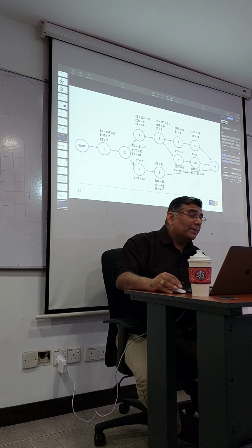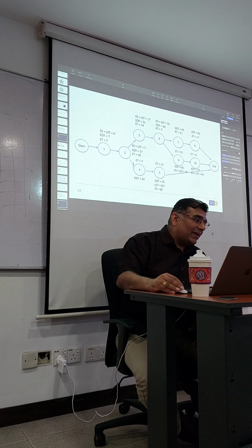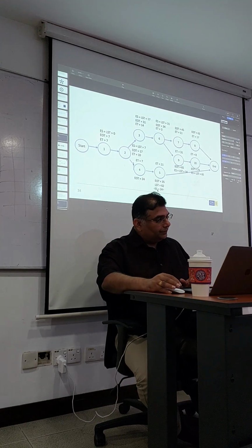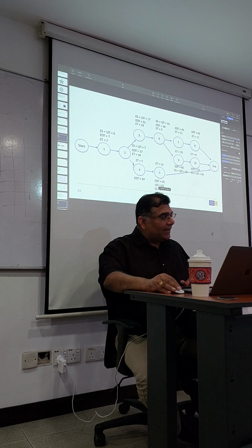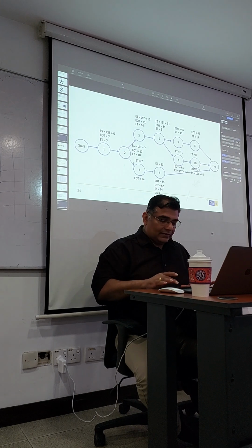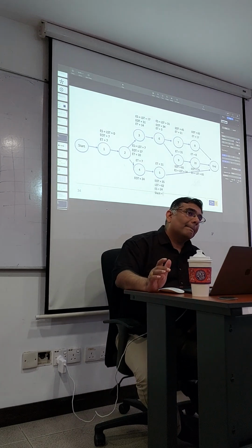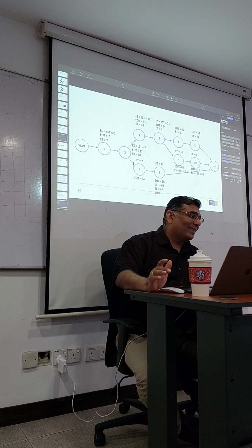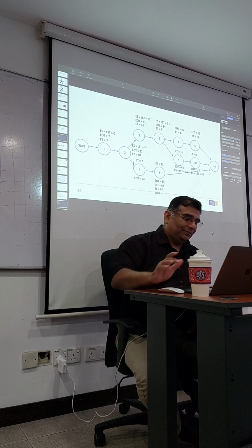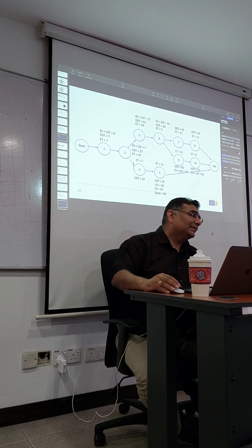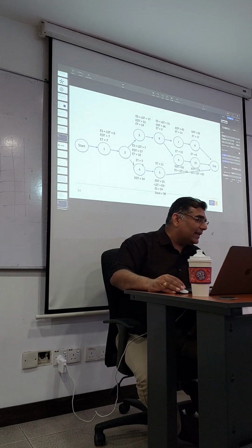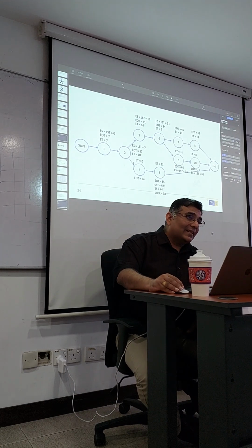Are we okay? Now, earliest start time is 24. So slack is how much? LST minus EST. Yes. So slack is 38. Okay, done. Now, next one. LST minus 7. What is it?